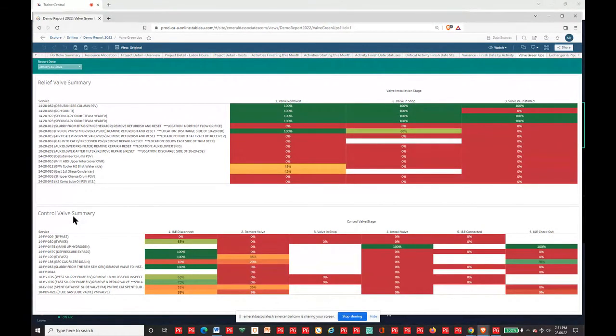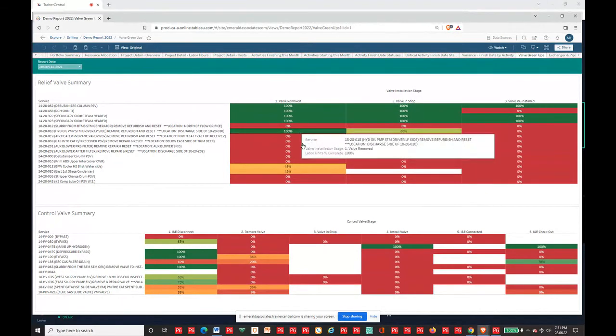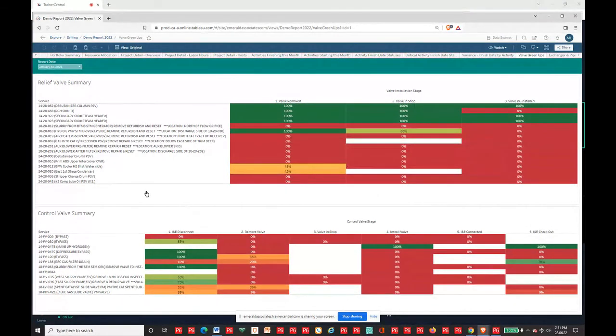Now, I've worked turnarounds where we had 500 PSVs, for example, that were coming out to be serviced, replaced, whatever was needed, and they needed to be of course, reinstalled after. So you were really tracking them closely, because if you got to the point where they needed to reinstall it and for some reason that valve wasn't ready, you got a problem.